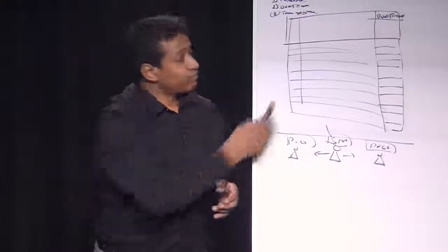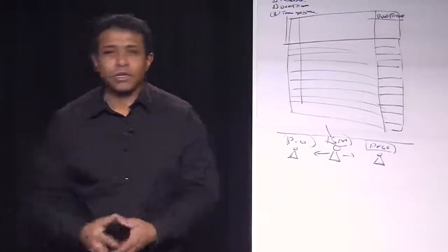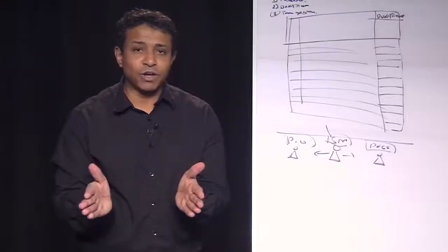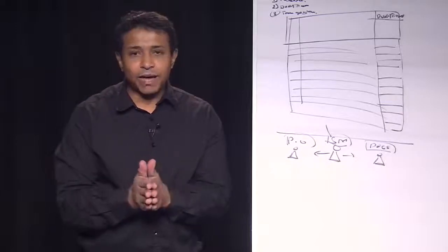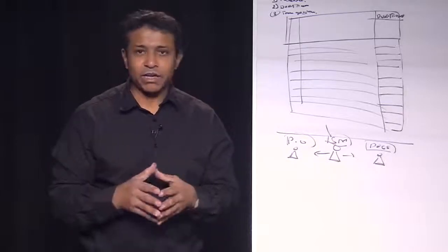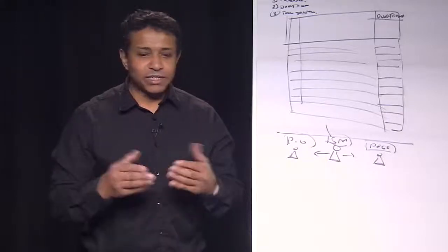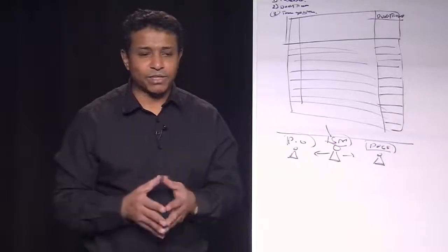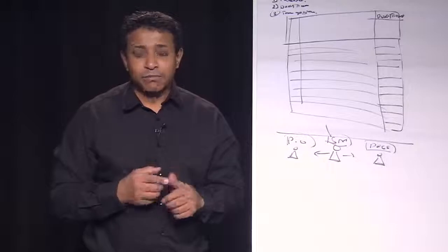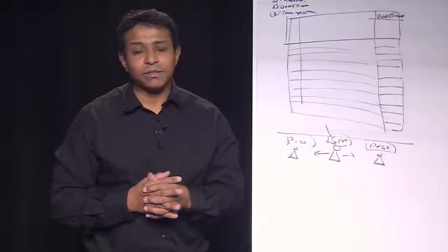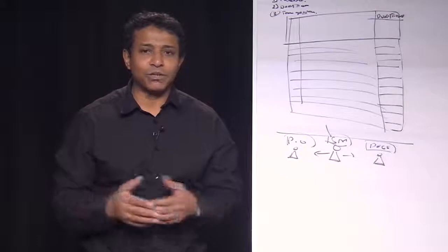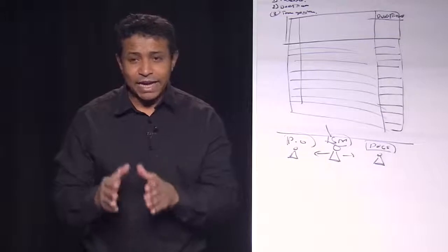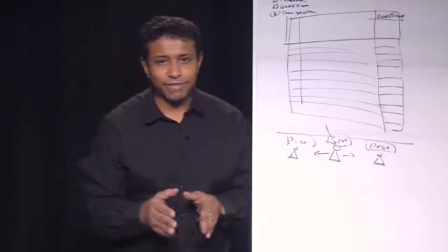Who is he to do so? The Scrum Master is a part of the devs. He is a part of the team of the devs. He is named by all the devs, meaning a Scrum Master does not name himself Scrum Master. It's all the team together that names a Scrum Master. Most of the time, the most experienced one, the lead developer. They can change any week, any month.